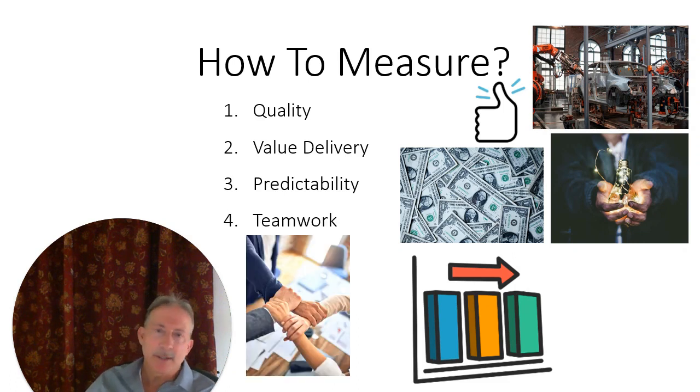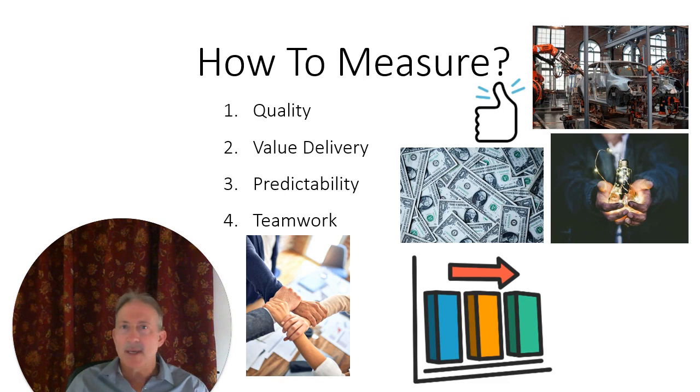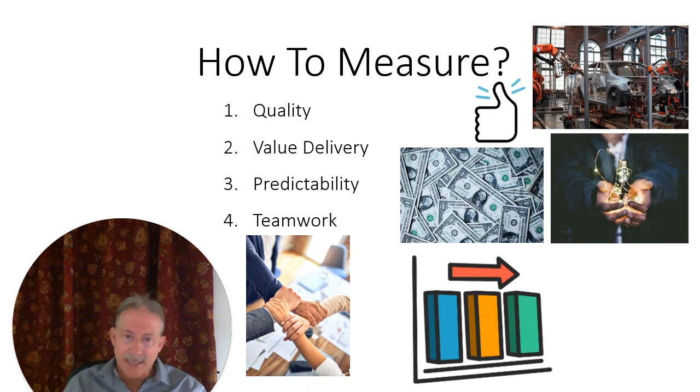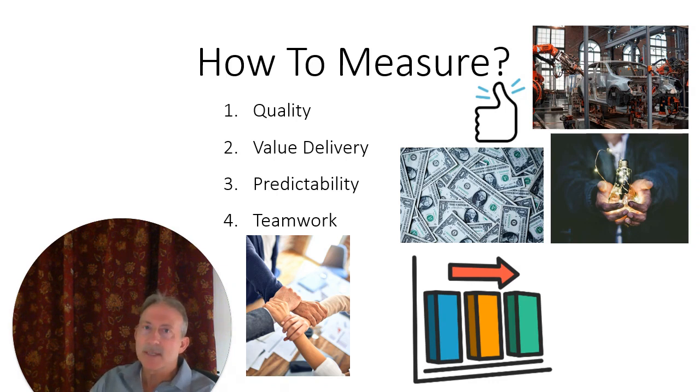And as to teamwork, well, you can measure it in different ways. You could say, how many team members overlap on any given story? Because overlapping, sharing, swarming, sometimes called, signifies teamwork. You could also say, how much does a given team, let's say Team A, help Team B? For example, dependencies and dependency management. If Team A is consistently delivering their committed dependencies to Team B, then Team A is demonstrating teamwork across teams. It's another way you can measure it.